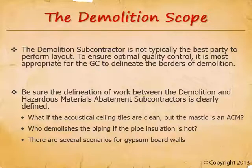There are several scenarios for gypsum board walls. If the gypsum board is clean but the taping mud has asbestos in it, the environmental subcontractor will just take the gypsum board with the taping mud. However, if the gypsum board and taping mud are both clean but the wall insulation is hot, the environmental subcontractor will cut out the gypsum board to access the insulation, take the insulation with them, and leave the gypsum board stacked on the floor for the demolition sub to off-haul. These are just a few examples, but they help illustrate the level of detail we need to get into in order to effectively delineate the work of these two trades.